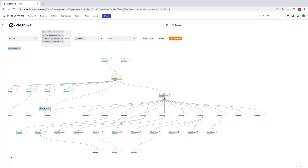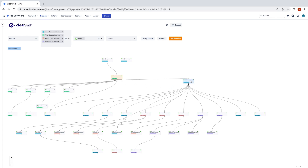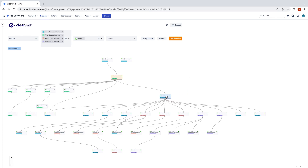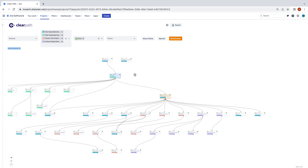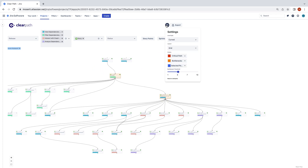Clicking the bottleneck button will identify these tickets in the tree. The default threshold for identification of the bottleneck tickets is 4 tickets blocked, but that threshold can be adjusted in your user settings.